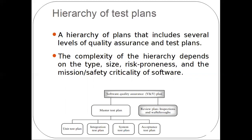Another level of hierarchy is based on levels of testing, that is unit testing, integration testing, system testing, and acceptance testing. Corresponding plans will exist for all these levels under the master test plan. The master test plan is developed by the project manager in the case of a traditional testing group. If a dedicated testing group is available, then the tester or the SQA team will perform this master test plan, but they need to get help from the project manager.